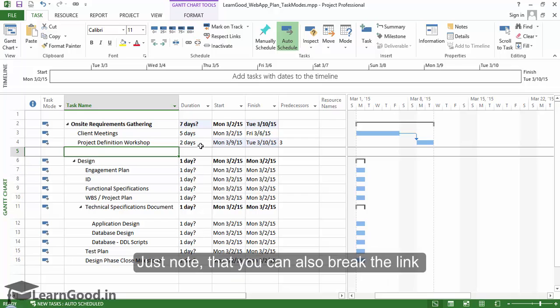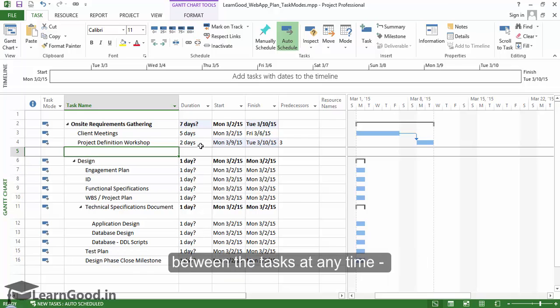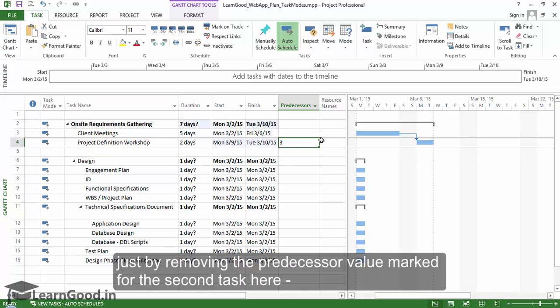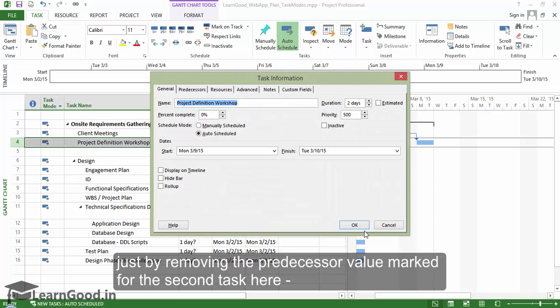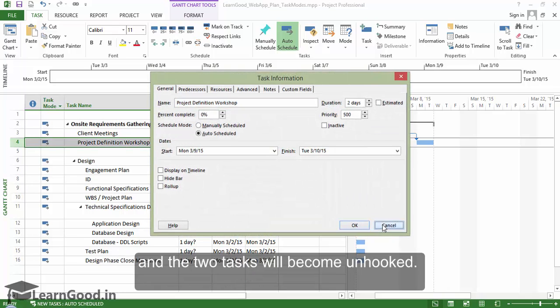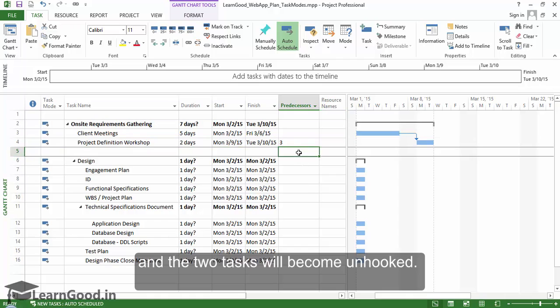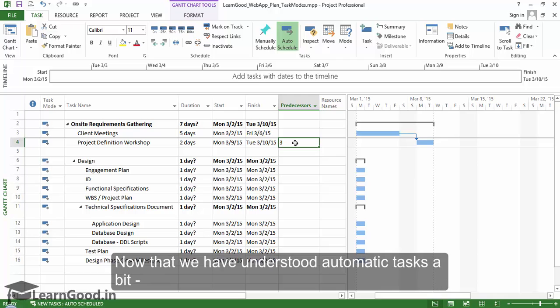Just note that you can also break the link between tasks at any time, just by removing the predecessor value marked for the second task here. And the two tasks will become unhooked. Now that we have understood automatic tasks a bit, let us look at manually scheduled tasks.